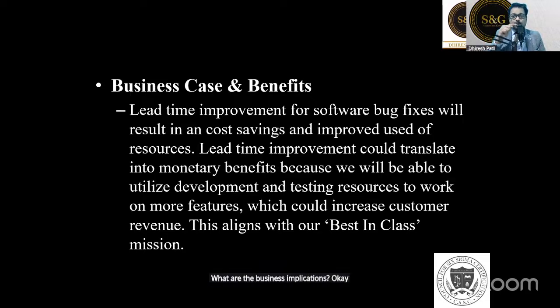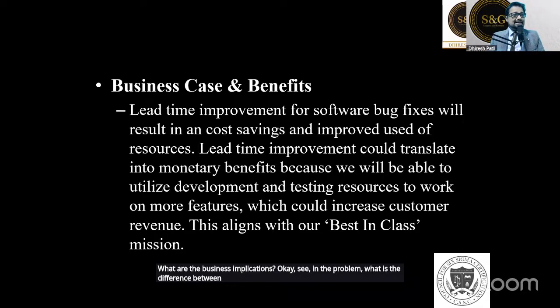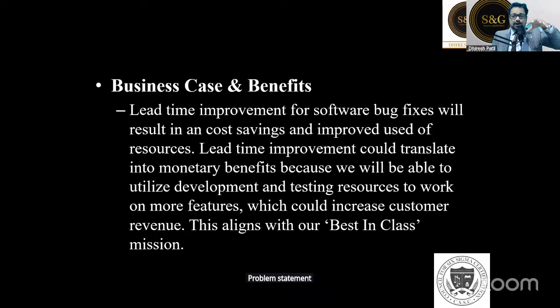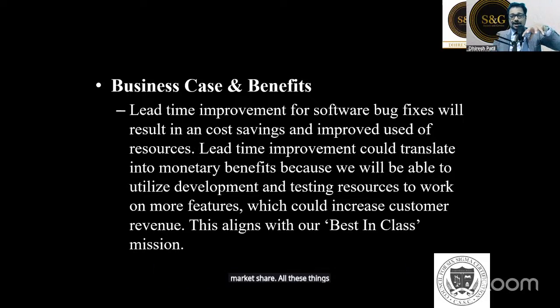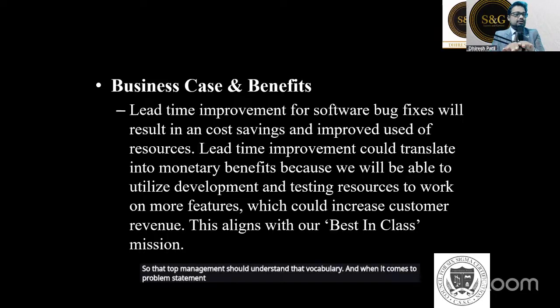What is the difference between the problem statement and the business case? The problem statement is very specific to that problem. The business case is the overall impact on the business, and it should be drafted in business language. You would be talking about turnover, the brand image of the company, market share. These are all business KPIs. You speak in business KPI language in the business case, so that top management understands that vocabulary. When it comes to the problem statement, you speak process language.